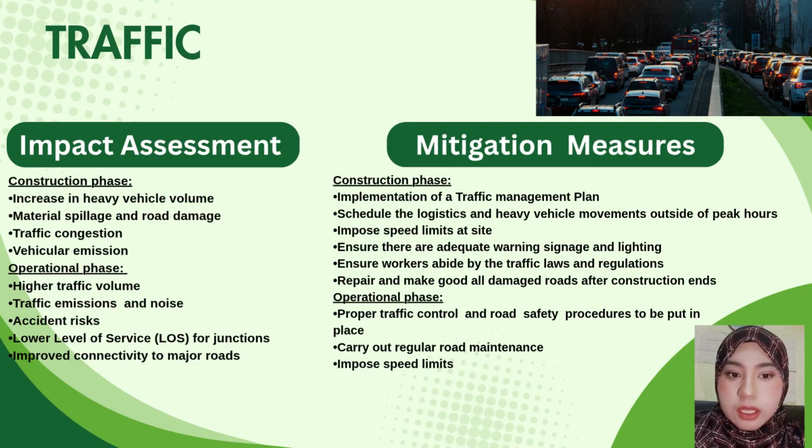Construction phase: implementation of a traffic management plan. Schedule the logistics and heavy vehicle movements outside of peak hours. Enforce speed limits at site.